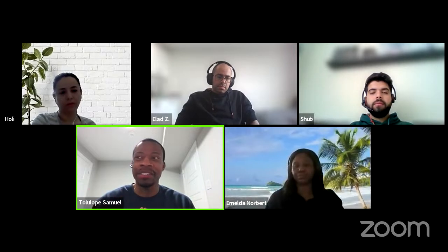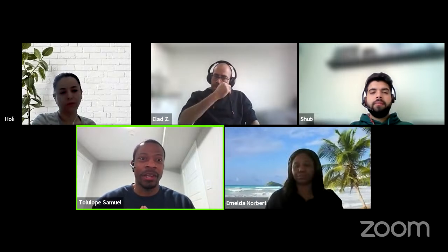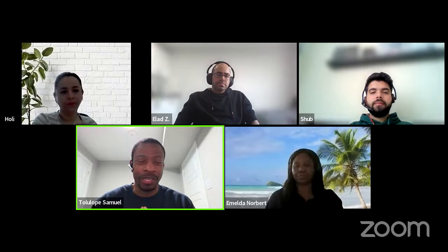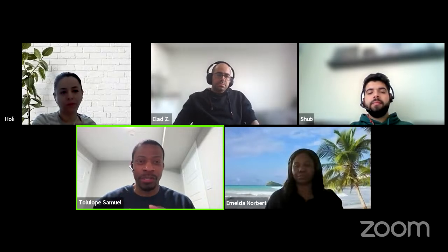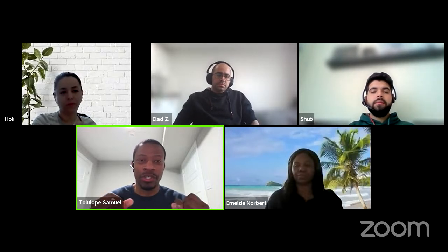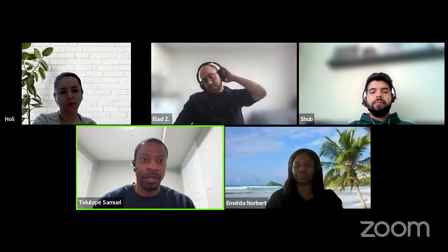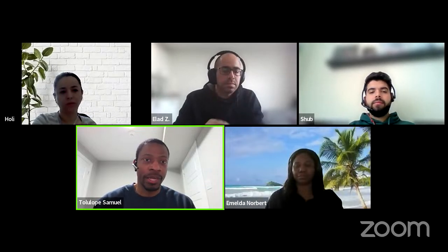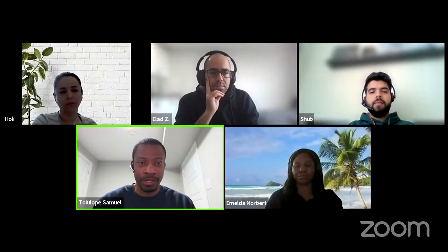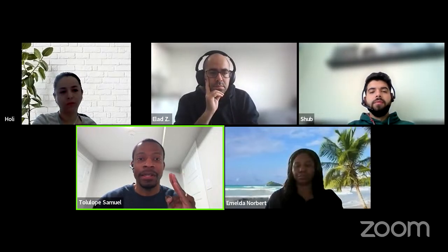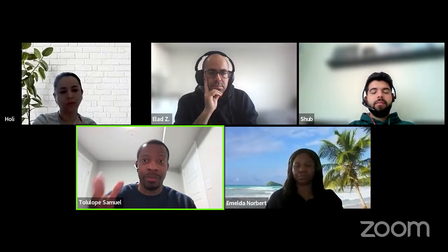It's not to talk about what are the complexities you're facing and what are the updates on your engagement with stakeholders and all that stuff. It's a very quick, straight to the point meeting where the question is, okay, what are we doing today? Are there any impediments we have to report that we have to address right away? What are we focusing on in the next 1 or 2 days? Straight to the point.